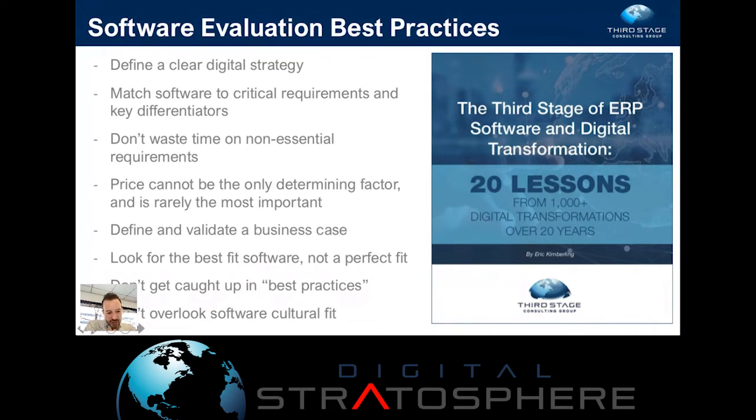And sure, maybe they can deploy technology in 6 or 9 months or whatever number they're giving you, but to totally transform your business, it might take you 18 or 24 months. So you've got to figure out how to reconcile that and say, okay, the technical vendor is telling us this. So how do we bake that into an overall broader program that might elongate their work stream, but it also looks at other work streams that need to be considered as well.